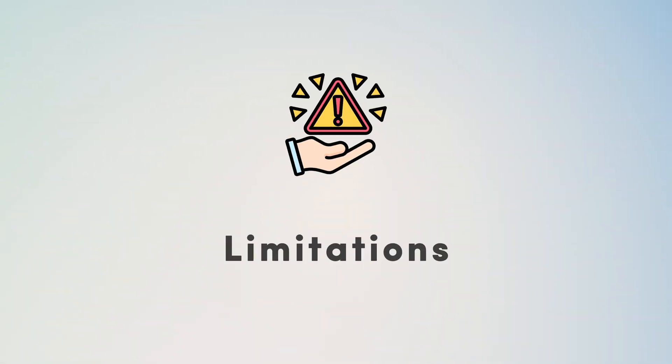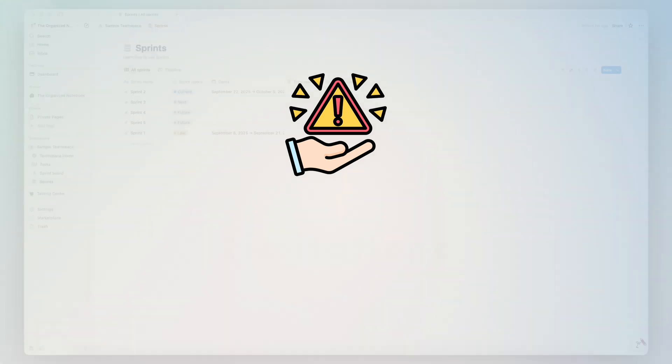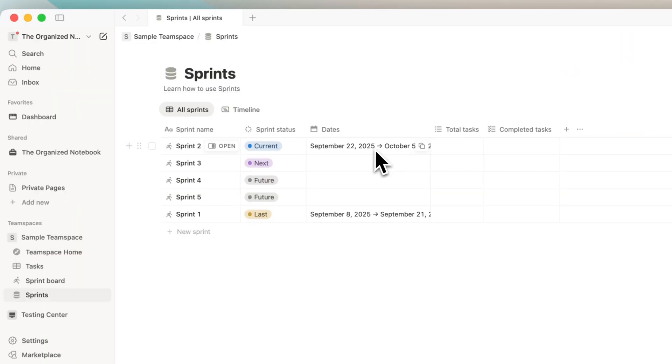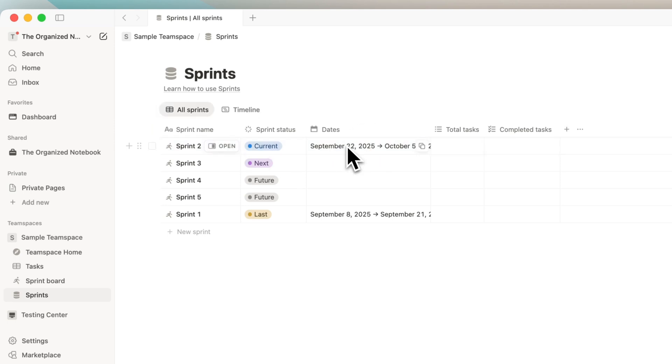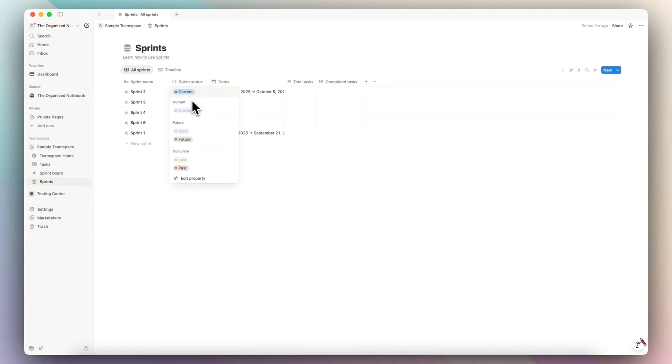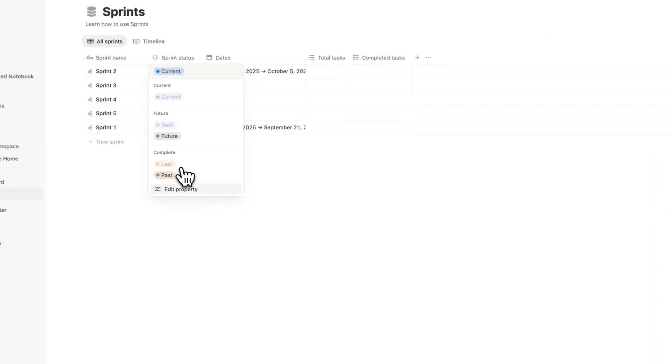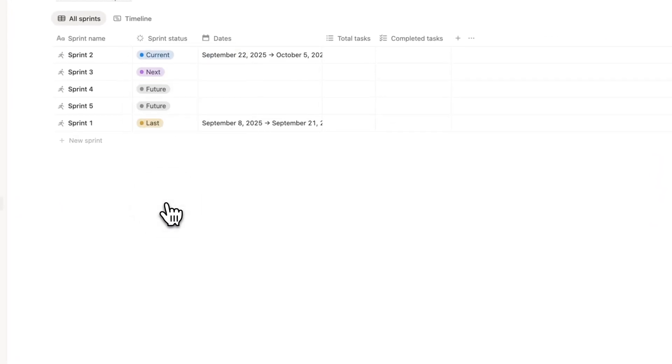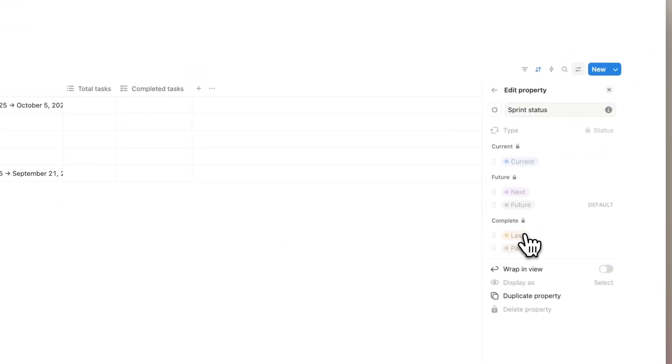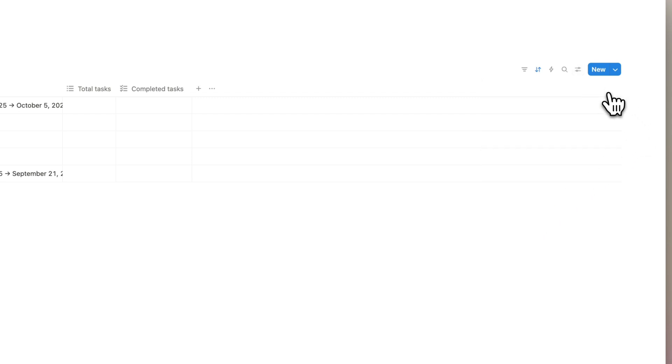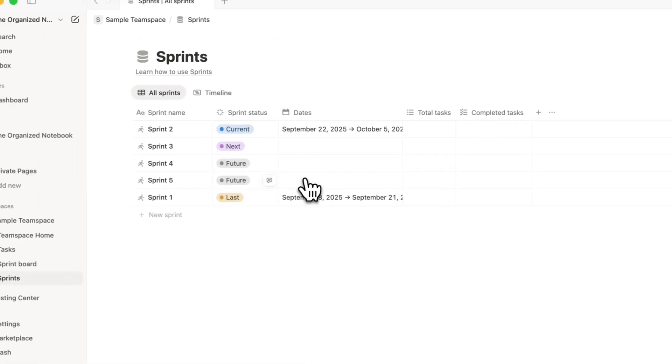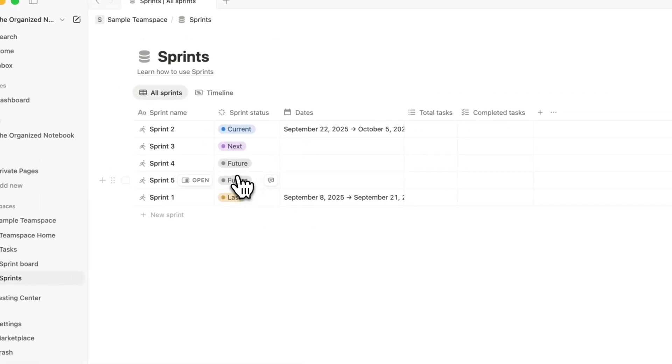Next, let's talk about the limitations for sprints. So the first thing that's a limitation with this feature—even if I click this, I can't change it once the sprint has been created. The other thing is that I can't change the sprint statuses. So those are also locked. If I click edit property, you can see that they're all locked. And this is because this is a built-in feature that operates differently from typical Notion databases.